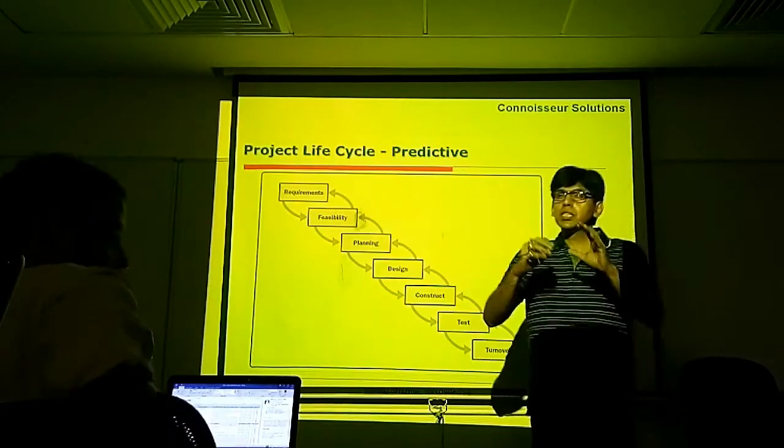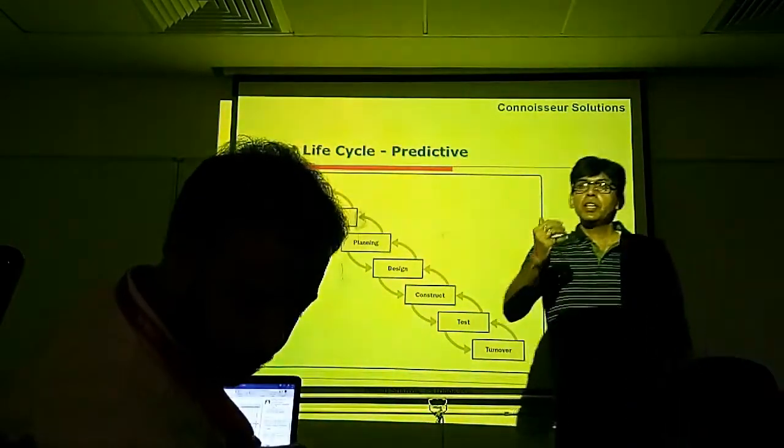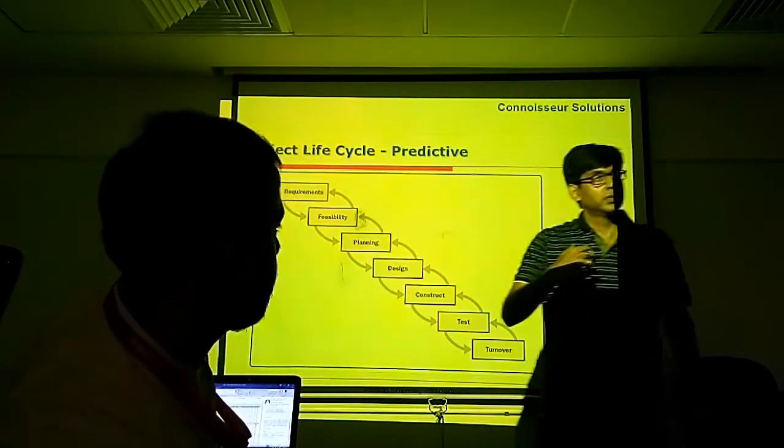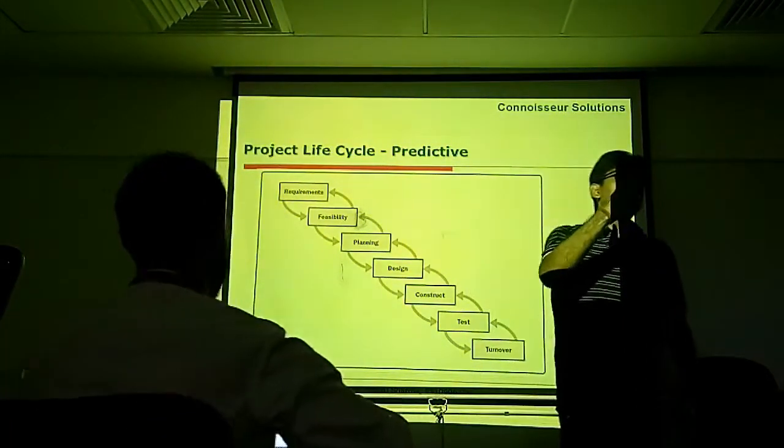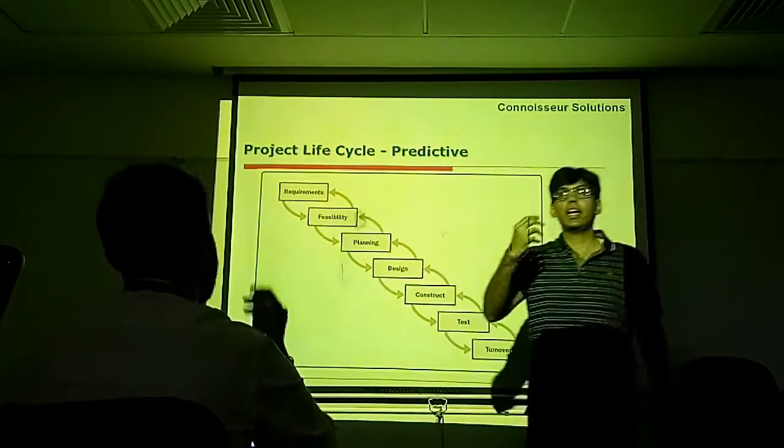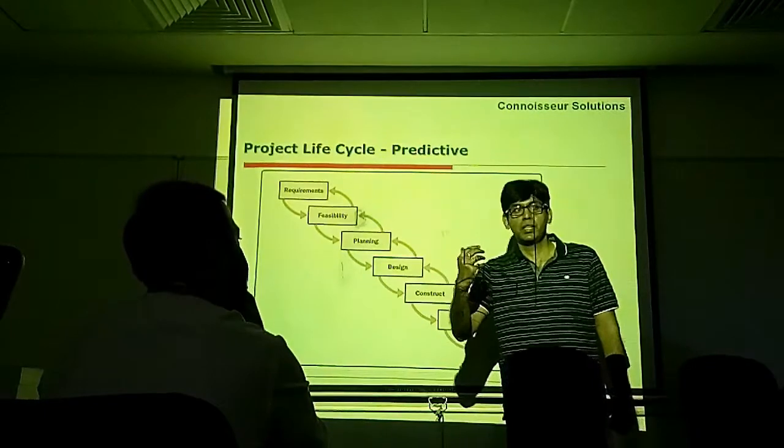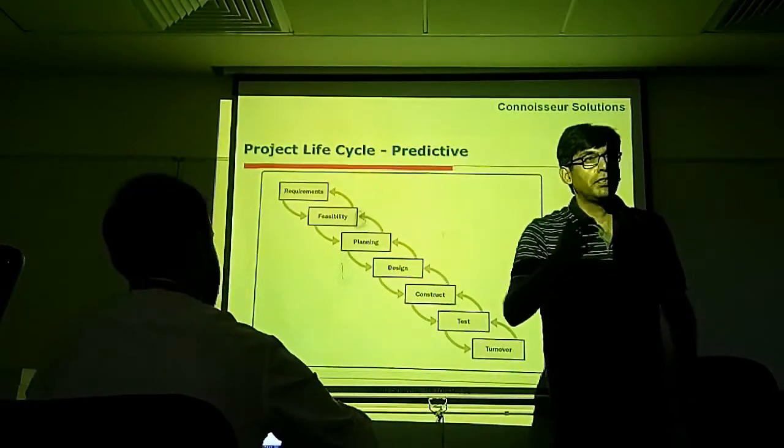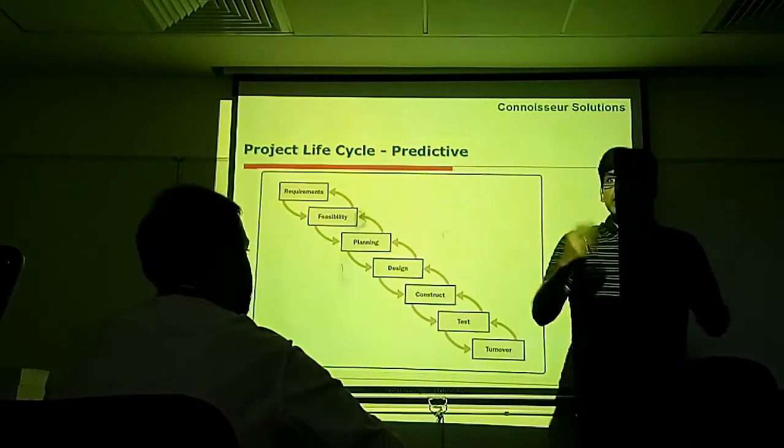Now there are certain projects where you can easily predetermine the scope. Right from the beginning you know very clearly what has to be done. Such projects will have predictive life cycle, they can be delivered in a single delivery stage.